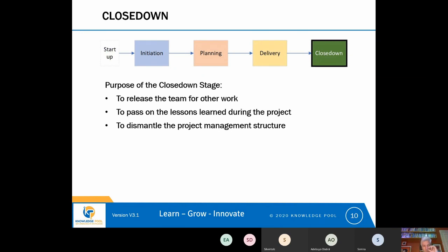So it's not uncommon for projects to have to submit a weekly status report. And I got into the habit of every week, after the weekly status report was done, thinking about what we have learned this week, and we logged those lessons that had been learned.